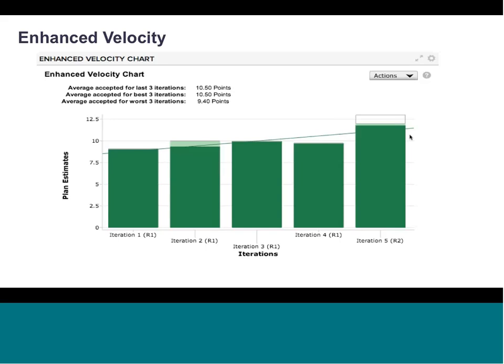Like, you can't do PI planning, you can't do this sort of release planning unless you have a good idea of what your teams can do. One thing I would also say about this is new teams can typically expect to see an increase in velocity, right? I mean, that's kind of common sense. Existing teams track velocity just to make sure they're getting a consistent performance over time. So you just want to make sure everything's in line.